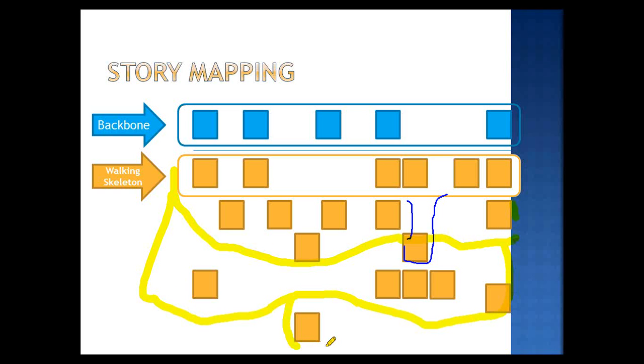And the last thing we'll release is this. This is release 4. So you can see how this becomes a very powerful tool for doing release planning very quickly. And when you do it this way, there's almost no argument from people about why this is release 1 and why this is release 2 and what goes in here and what goes in there, because they can see it very clearly that, oh, geez, yeah, these are the most high priority things because the customer uses them the most, and they hang together as a cohesive unit.